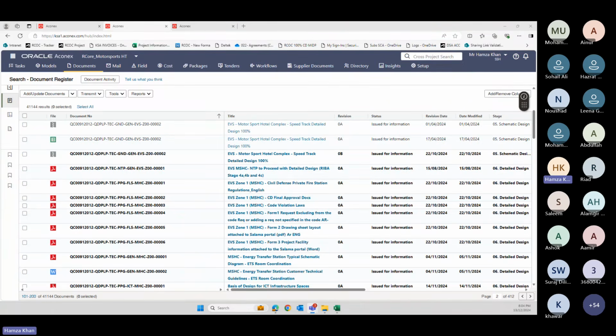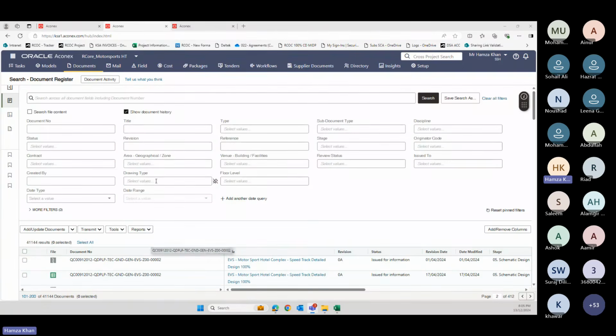Shazeb, you have to check whether the file name is correct or not, the naming convention of your file. Let's say your file name is file 1, file 2, file 3, so it should be the same in your metadata, document number column, and your file column with the extension of your file. Even if it's not there, just go to your temporary files and have a look there, to see if the file is uploaded properly or not. So this is how you can check your document history.